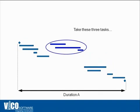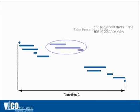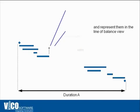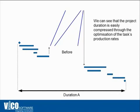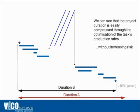When you look at a Gantt chart schedule and transform just three activities into a flowline, you can see that the task in the middle has a lower productivity and a slower utilization of locations than the two activities at the beginning and end. By synchronizing the production rate and utilizing locations at the same pace, our customers experience approximately 10% compression of the schedule. With this additional dimension — locations together with productivity — you have the ability to optimize and compress the schedule by at least 10% on average.